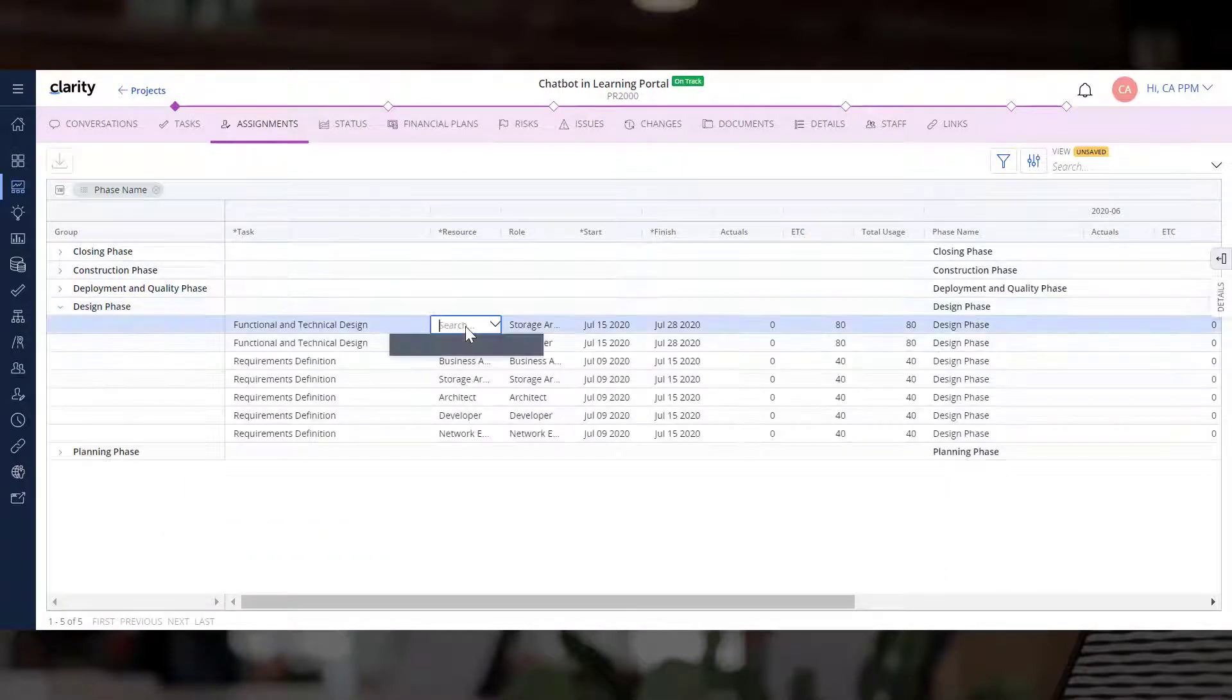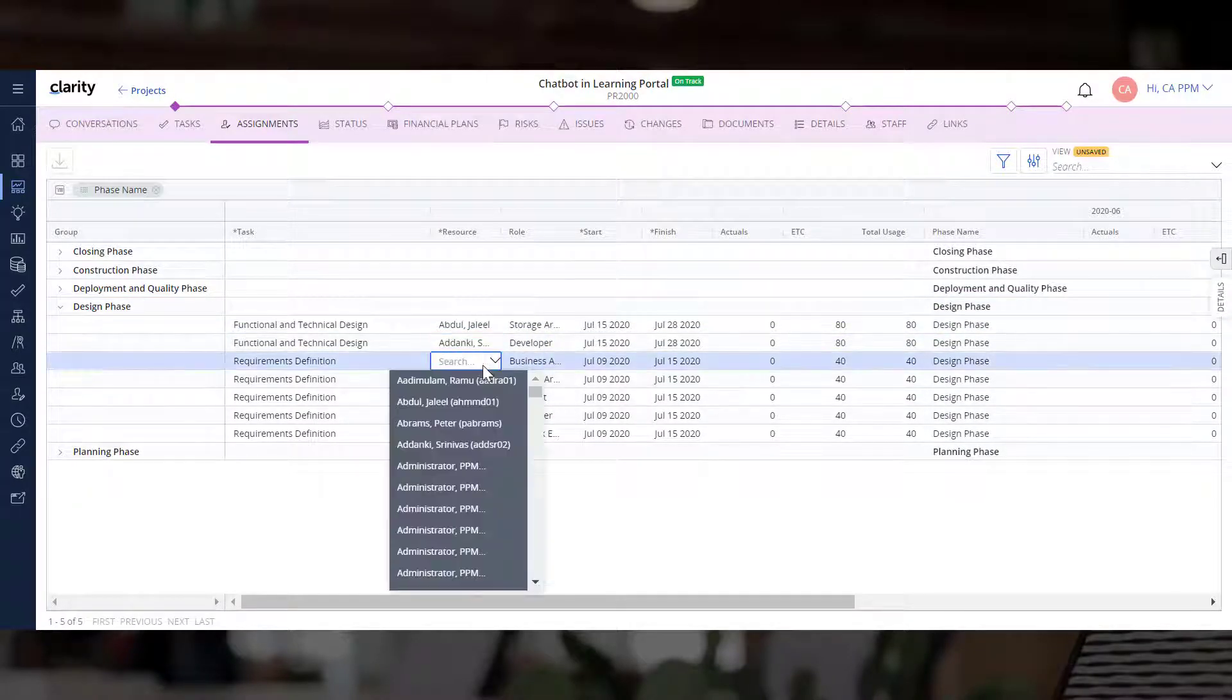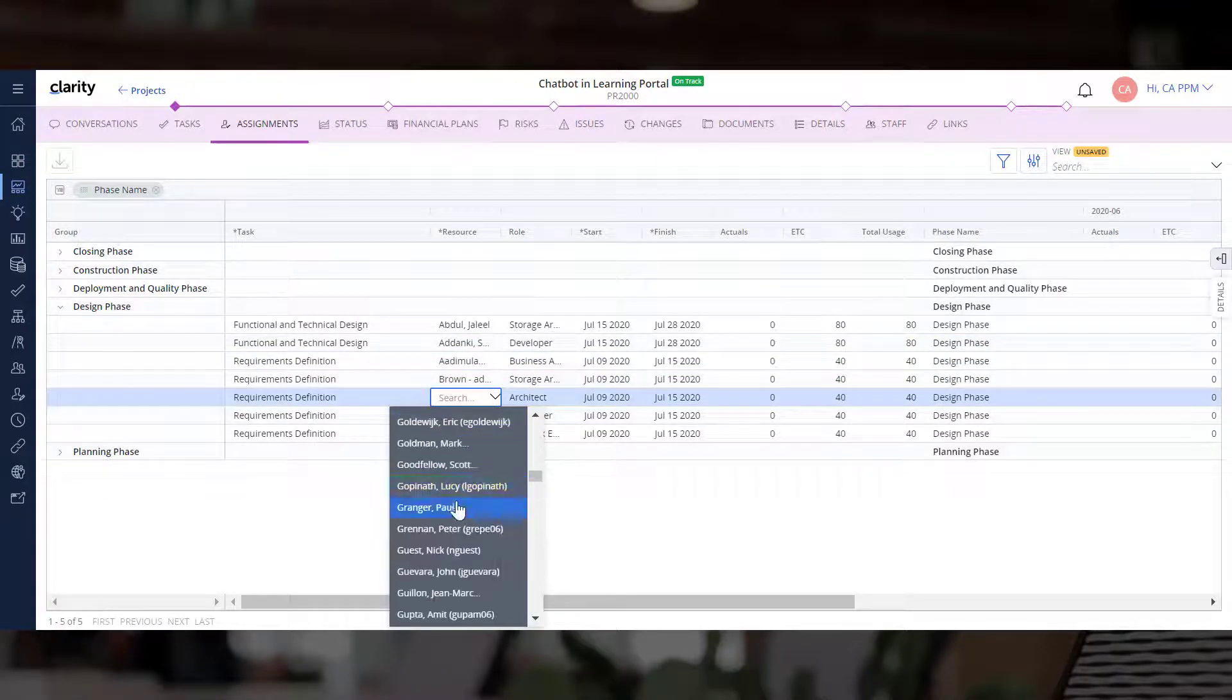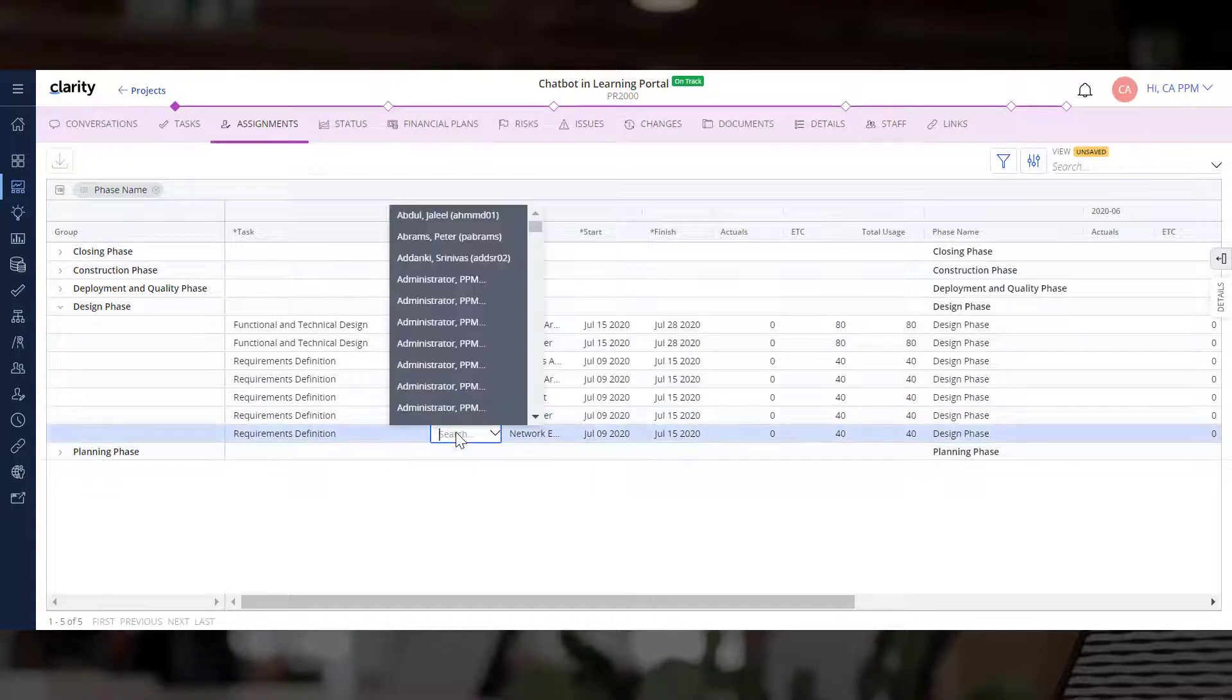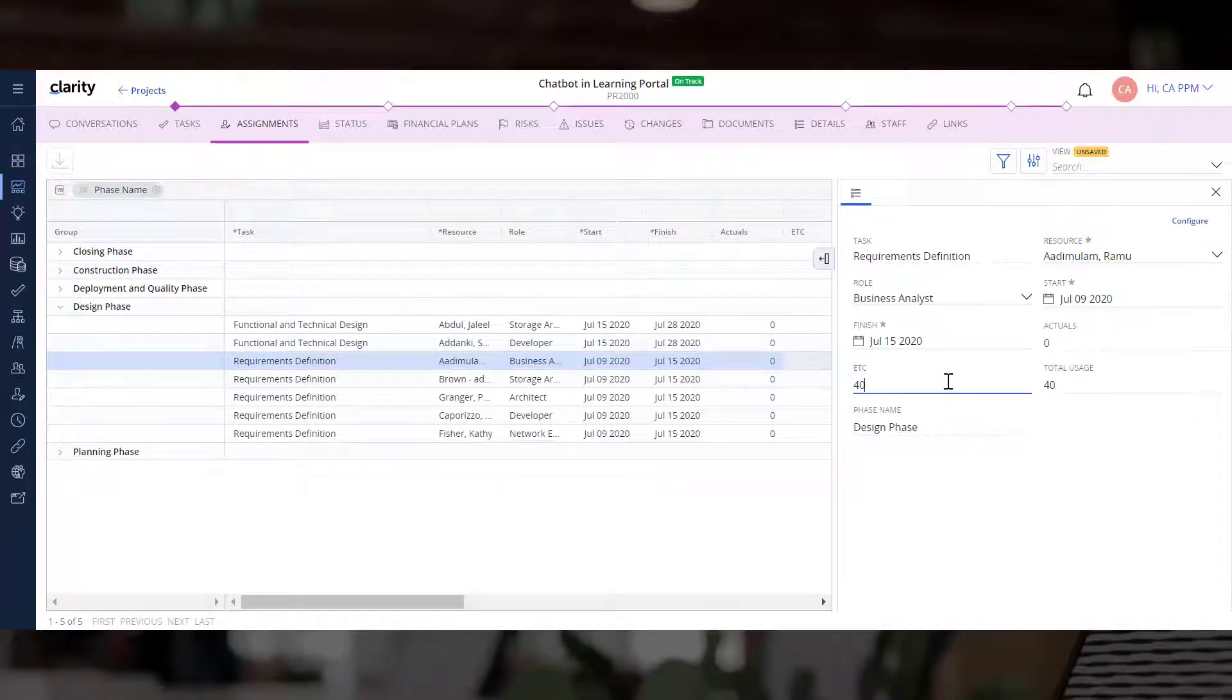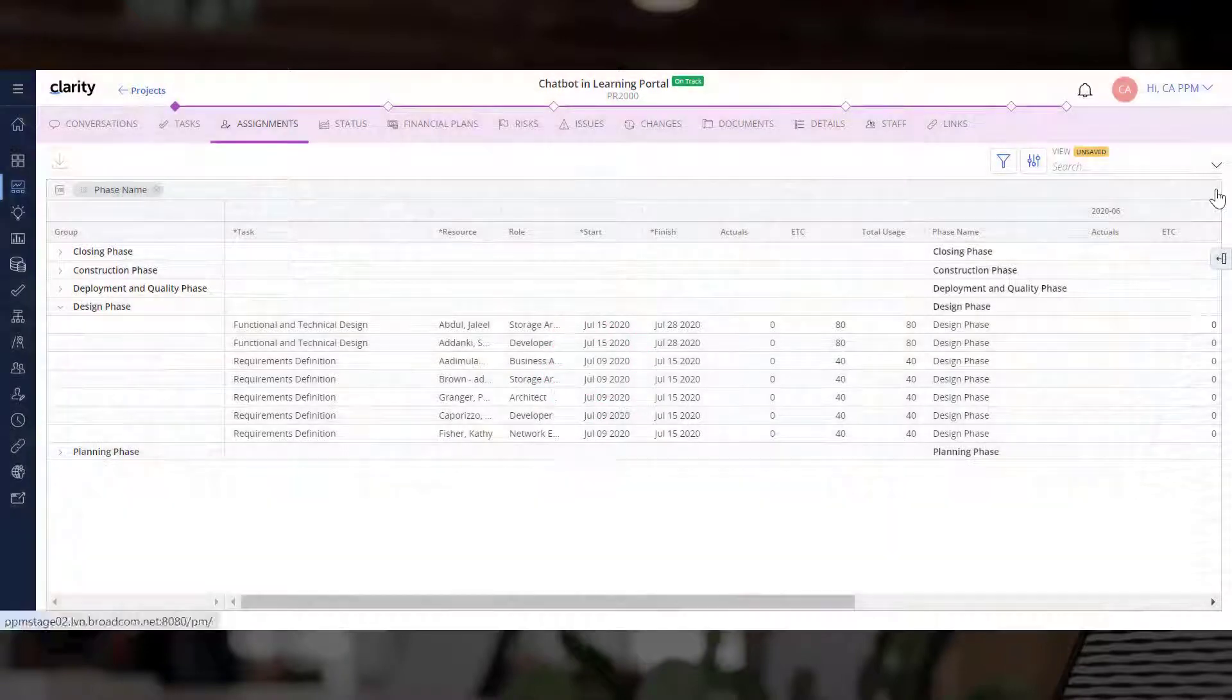Let's assign tasks in the Design phase to various resources. Let's also update the ETC for one of the tasks. We can click the Refresh to view the updated total.